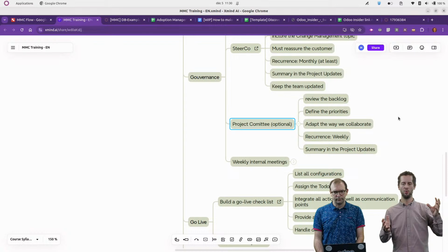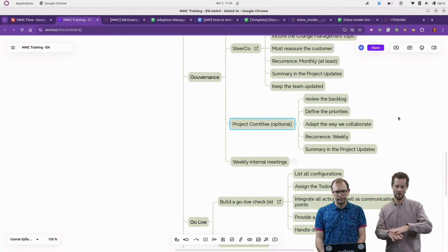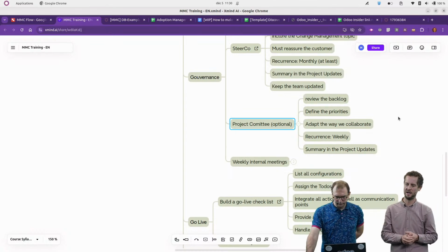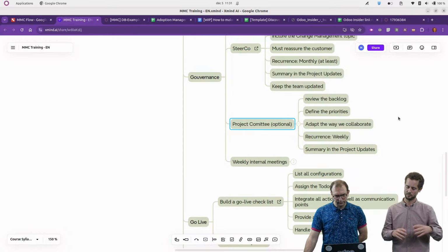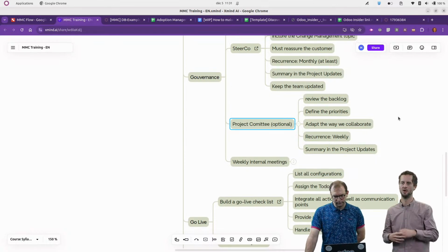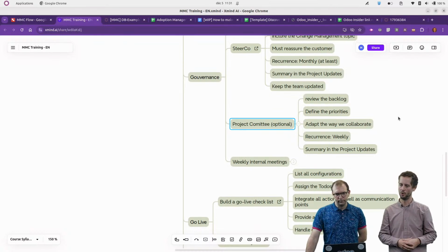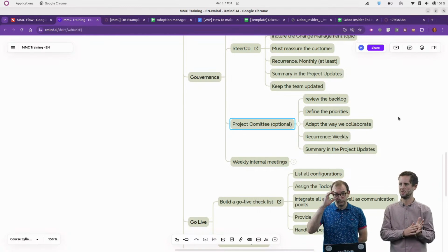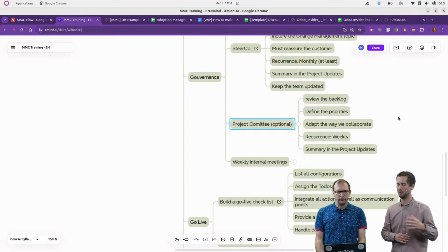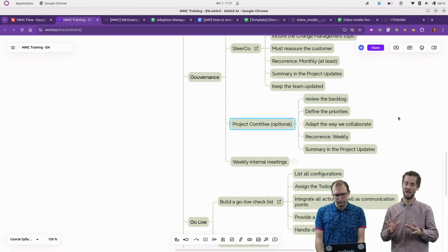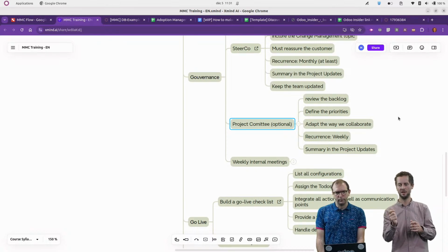When we face a project, sometimes they already have the entire IT landscape to fully operate, and we're going to replace some block of this landscape, and so we still have to connect the data in a way, or to share the data with the other platform. So I would say in 90% of the projects we have, we still have to integrate with an external platform. But sometimes just for a short period, just to make the bridge or the link between two phases, where we're going to remove some application.